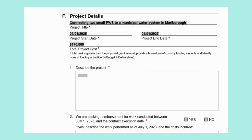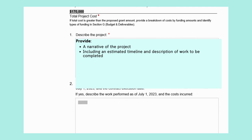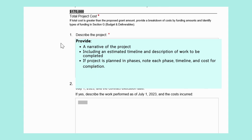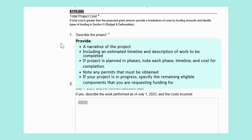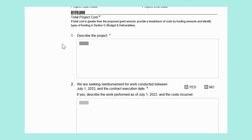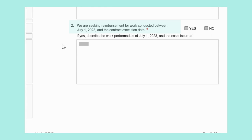Next, Question 1: describe your project. Provide an overall narrative of the project, including an estimated timeline and description of the work to be completed. If the project is planned in phases, note each phase with an estimated timeline and costs. Please also note any permits that will need to be obtained from MassDEP. In Section G, you will complete a more detailed budget breakdown and deliverables. For Question 2, you will need to mark whether the project is a reimbursement project. If this project is seeking reimbursement for work conducted between July 1, 2023 and today, check yes. Our project will not begin until next year, so this is not a reimbursement project — we will select no.